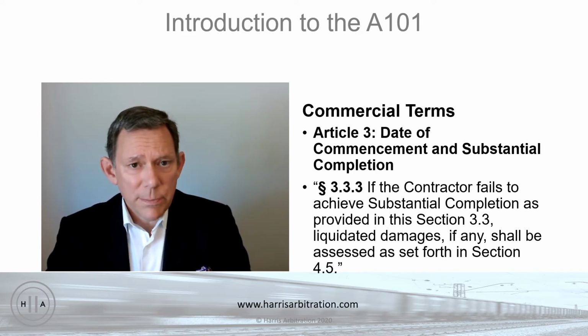liquidated damages. You'll remember from first year contracts, liquidated damages are damages that the parties agree on at the front end in the negotiation of the contract, so that if there's a breach, the breaching party will owe Y number of dollars to the aggrieved party.